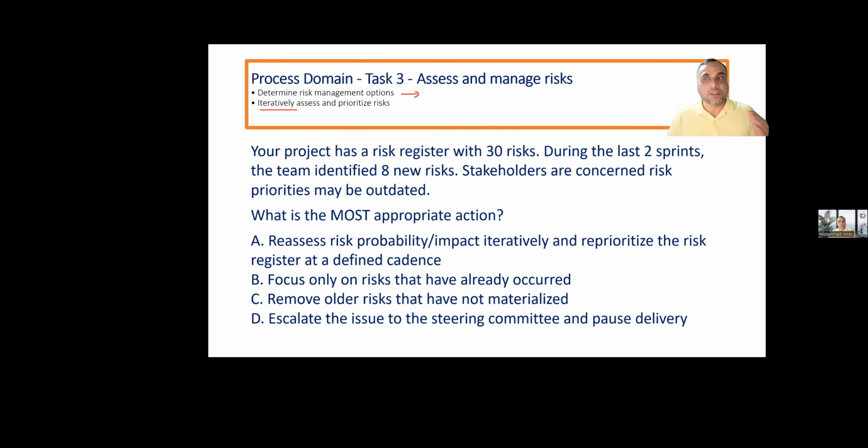The risks which are lower than the risk capacity go into the watch list. We will carry the watch list and risk register, and it is my responsibility as a project manager to keep reviewing them. When the time of the risk is finished, I have to close it. When a risk has occurred, I also have to close it. When minor risks become major risks, I have to update them. When major risks become minor risks, I have to update the contingencies, and unused contingencies should be given back to the stakeholder organization accordingly. So let's continue and try to answer the questions.